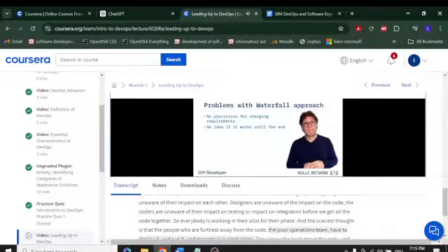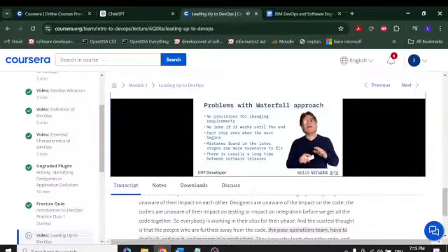thing to production. In addition, with each phase, there are issues that are just passed down. And of course, every one of these is an opportunity to lose information and to have a mishap. People get blocked because they can't accept the work from the previous phase, and then the next phase is delayed. Mistakes that are found later are very, very costly. It's especially costly to find something that's designed wrong in a testing phase and then go all the way back and redesign it. Finally, these delays create long lead times between deliveries.